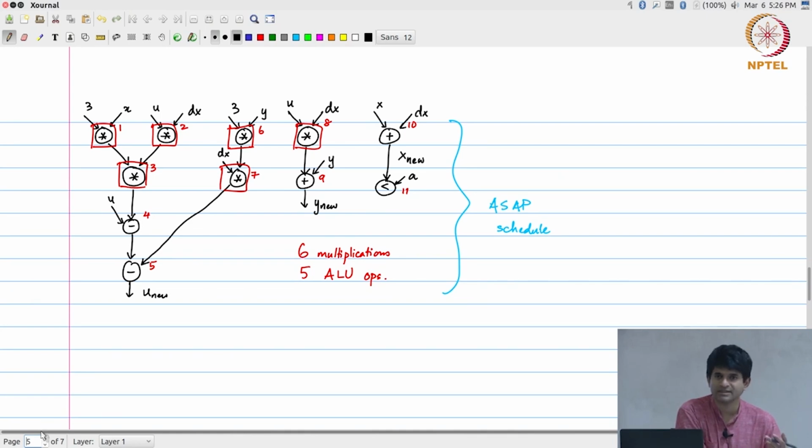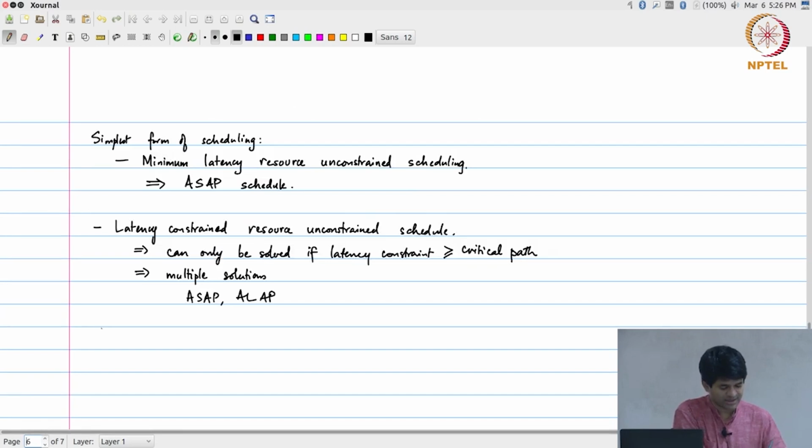It turns out yes, there is an algorithm called topological sorting, which allows you to find an ordering of these nodes such that none of these dependencies are violated, right, and I can just pull out the nodes in that sequence and schedule them as early as possible, as and when they become ready. Okay. So, these two problems are both solvable in polynomial time.